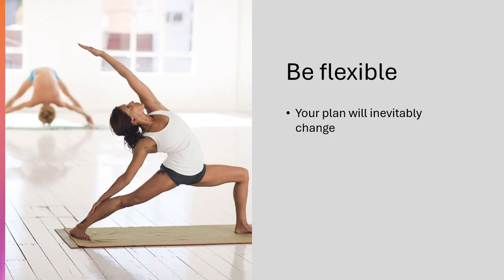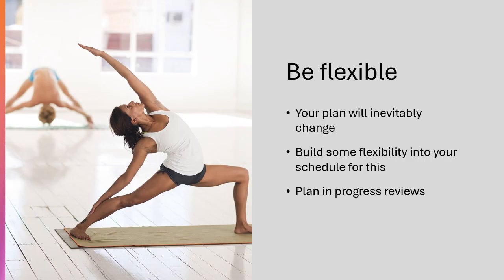Your plan will change, of course, because life is rarely simple and there will always be unexpected tasks, issues or challenges that impinge on our time. But that's not a reason not to create a plan. Instead, build some flexibility into your schedule. For example, leaving some hours free every week for unforeseen tasks or delays. Also, plan in progress reviews at regular intervals, perhaps on a monthly basis, so you can adapt your plan in response to any changes in your circumstances or progress.